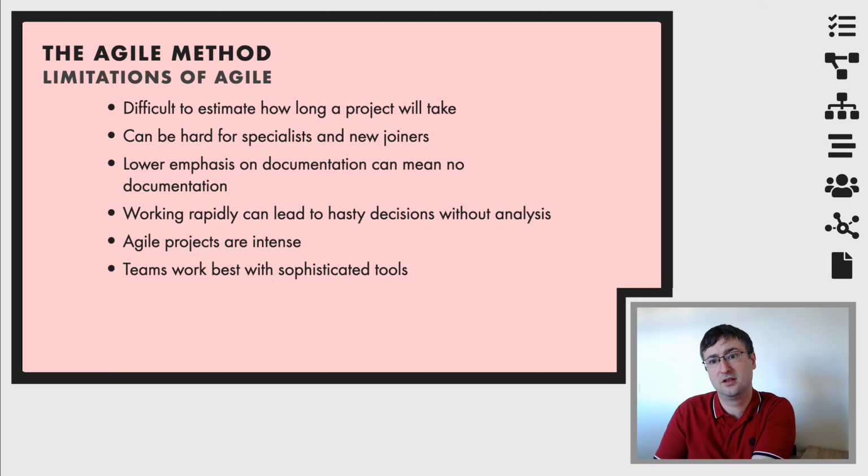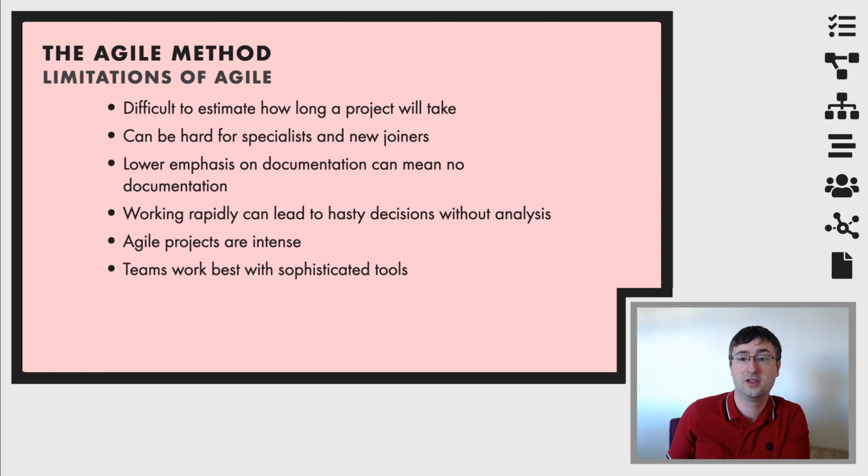Agile teams, there is the possibility inside of an Agile team to forget that the outside world exists and to just continue working because you think, I have to get all of this done. And that normally happens at the start of Agile projects when you haven't really figured out what your burn down rate is for a team yet. You haven't figured out how much work you think you'll be able to do in a week.